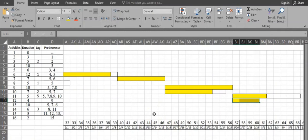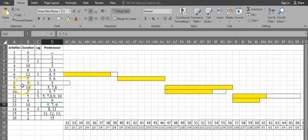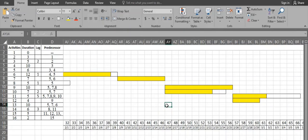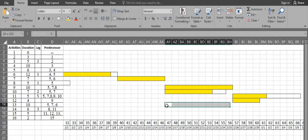Activity 13 has 3 predecessors: activities 5, 6, and 7. The latest finishing activity among them is activity 7, which finishes on day 46. So activity 13 starts from day 47 and has a duration of 10 days: 1, 2, 3, 4, 5, 6, 7, 8, 9, 10.